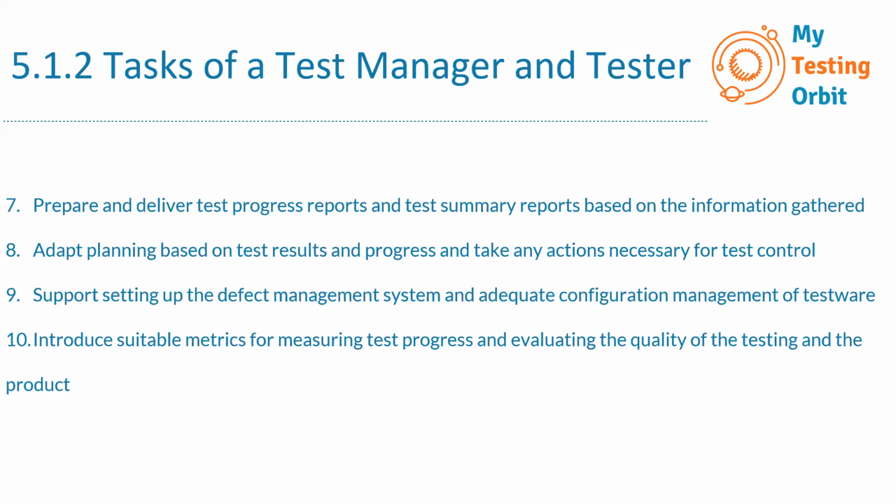Or it can be that when the testing was done by the team, how many bugs were reported in production which were missed by the test team, because that will also give us an idea that though the testing was completed and signed off, there were still lots of bugs in production. A root cause analysis is done for that to identify if there were any gaps, by which maybe we can improve the coverage of testing next time.